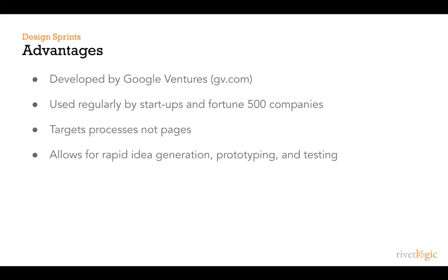The key advantage, though, is that it's flexible to respond to changing priorities. Throughout a project, priorities change, needs change, new information comes in, new technologies might be found. And when you lock yourself into the traditional waterfall methodology for any type of digital transformation, those changes then oftentimes get ignored or pushed to the side or become so large that they end up derailing the project. With design sprints and development sprints, you can quickly add new job stories as needed to bring it into the process and turn on a dime to account for that.